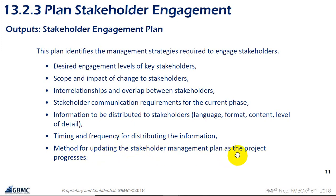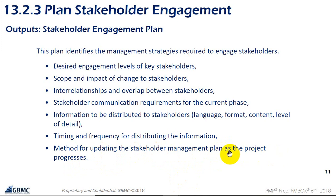Finally, the plan covers the timing and frequency of distributing information to keep stakeholders at the required level of engagement — for example, monthly. It also includes the method for updating the stakeholder management plan as the project progresses, since any change in requirements during project execution must be updated and the latest version approved.